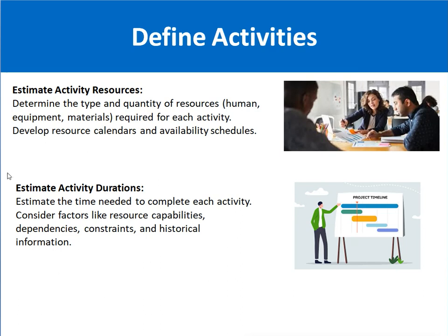Estimate the activity duration. In this process we have to identify how much time is needed to complete each activity. Consider factors like resource capabilities, dependencies, constraints, and historical information as well.